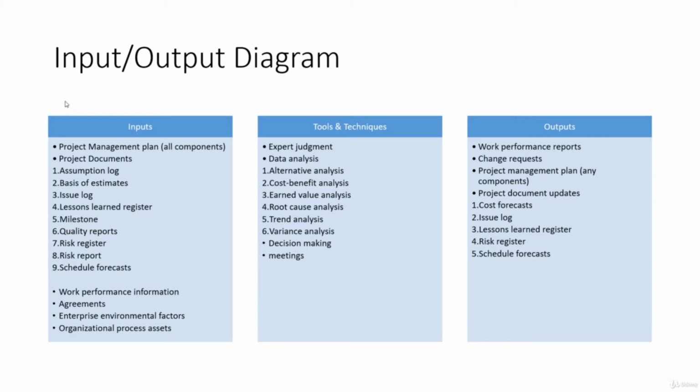So it has to be there in the assumption log, in the risk factors, because your stakeholders need to know. Because ultimately, there are third party applications you are working with. Those teams are not reporting to you. Even if you follow up with them, at times you may not get the desired response. They may take their own sweet time. So it's very important to go and report it to your stakeholders so that they can follow up with those teams.